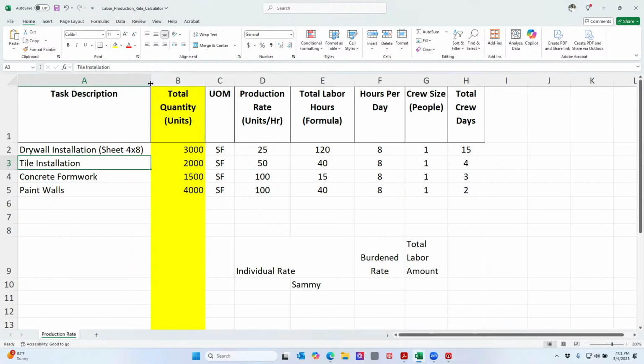Okay. Now, surely I can hang one sheet of drywall that's 4x8 in 1 hour. I would say on a bad day, I can at least hang one every 10 minutes. So if I can hang one every 10 minutes, then that means I can do 6 in an hour.